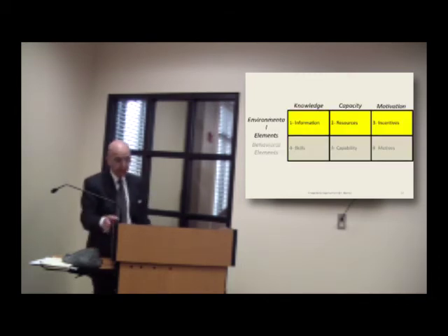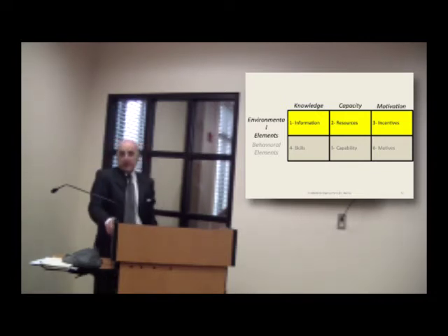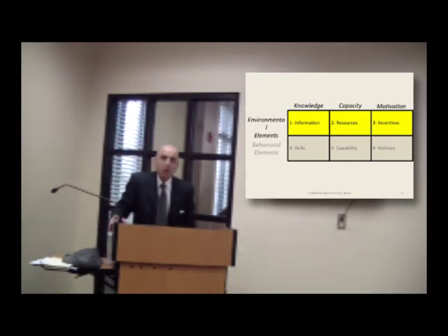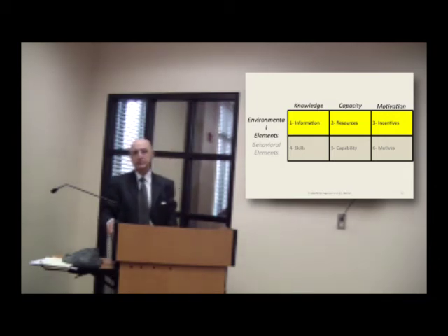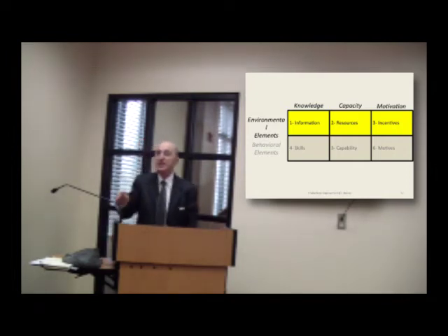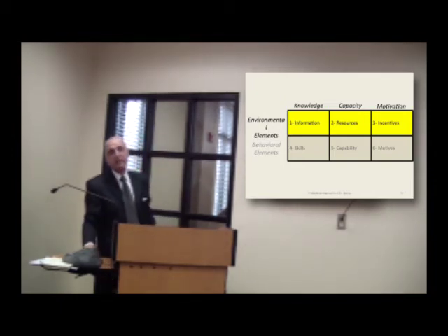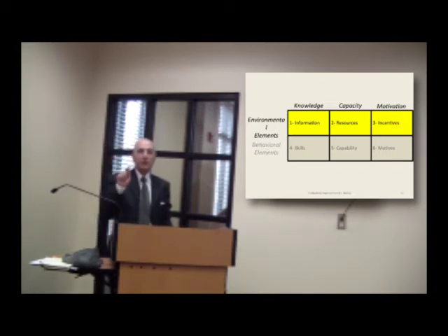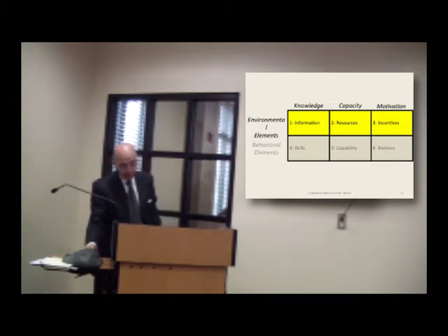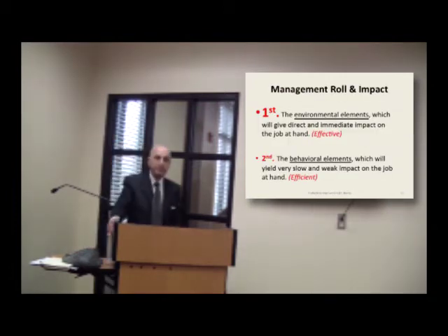Okay, let's go back. If you'd like to improve productivity, look for the exemplar. What makes the exemplar perform better than the average? Use the methods engineering model to analyze it, to see if one of those elements or a combination of them is the one contributing to it. Once you have decided that, consider the management role and impact.